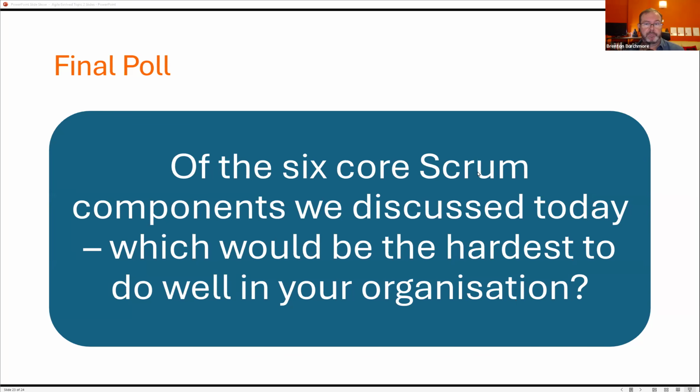But what I've seen happen a lot is that the status update of what did you do yesterday, what are you doing today, gets really condensed. I'm working on user story this yesterday, I'm working on it again today. More important is what you're going to do today, and you might say, I'm going to be creating database fields today. And someone else says, well, I'm creating database fields as well today, right? And that might be an issue, or maybe not. And so there's still a reason to do that, but it's meant to be that simple.